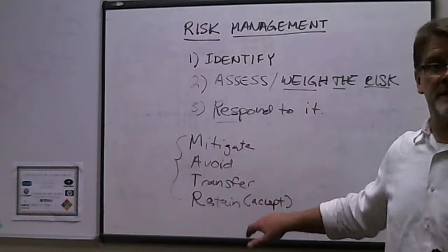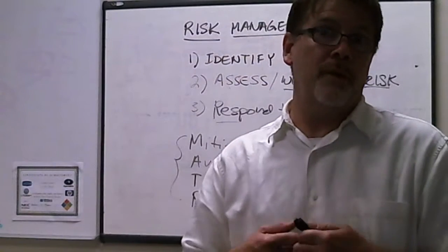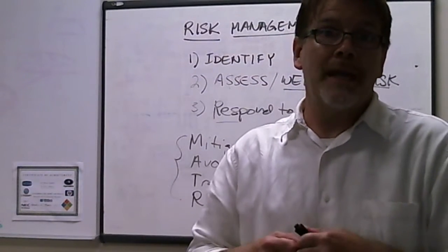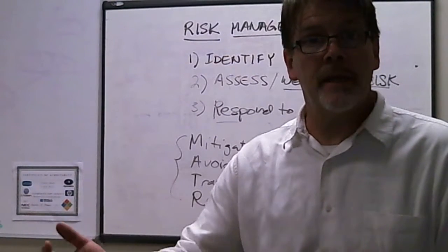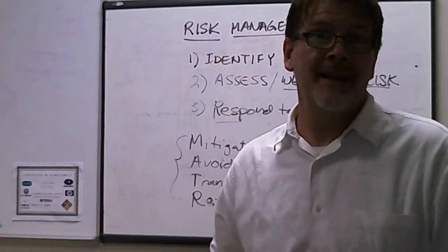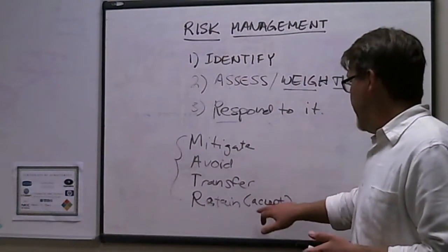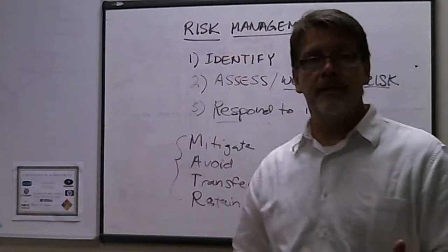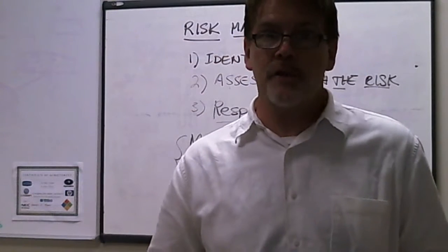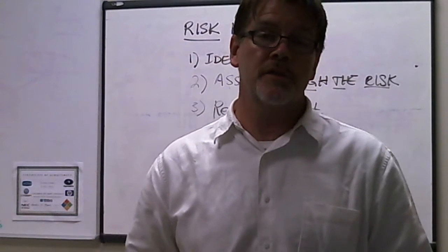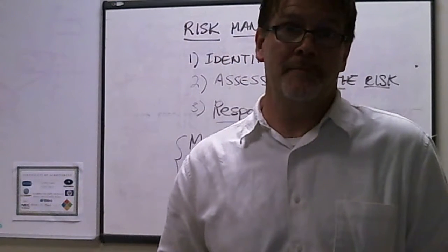We can transfer the risk. Like I was speaking to you earlier, we know that through transfer, we can purchase insurance, or we can identify some sort of contract vehicle that we can bring and partner with another company. So that may be a shared risk, but we're still transferring that risk, right? And then lastly, we just accept the risk, right? We just accept the fact that it's going to be fine, and if this risk event should occur, we'll be able to manage it during the course of the project. So that, in a nutshell, is my lecture to you for risk management.